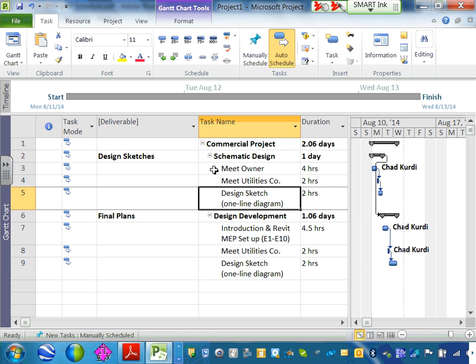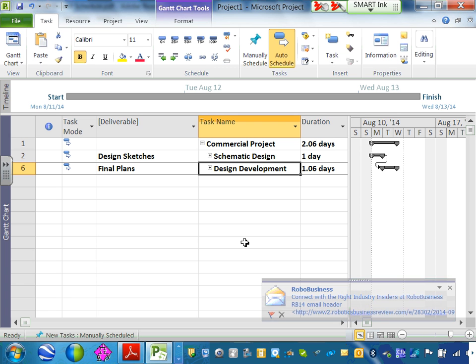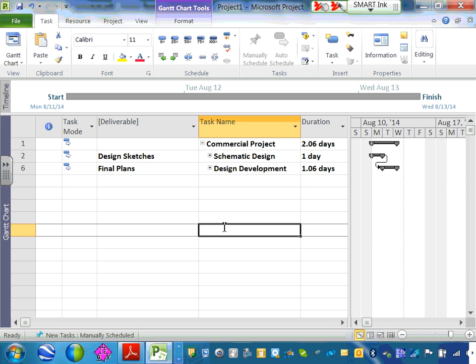So when you minimize, look at what happened when you minimize the tasks. Jay, can you see how the phases are linked down? Not only the tasks are linked, the phases are linked. When a task is done, the other will start, and when a phase is done, the other phase will start. Okay? Can I trust that you guys will monkey around with that?